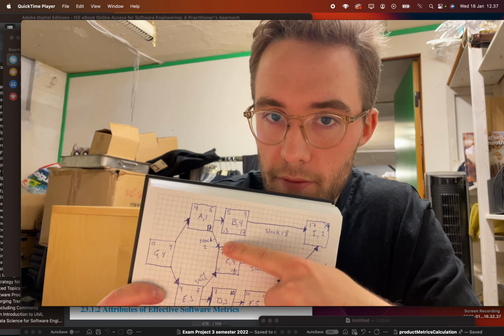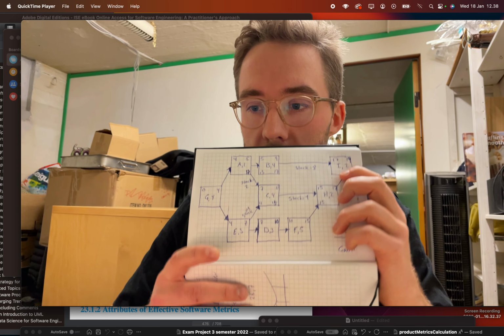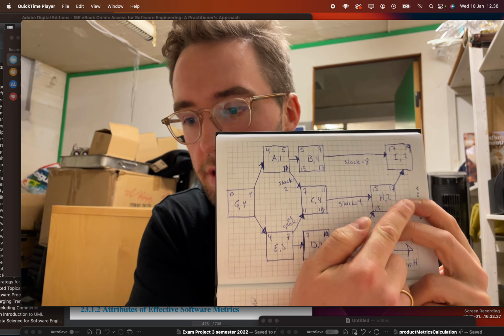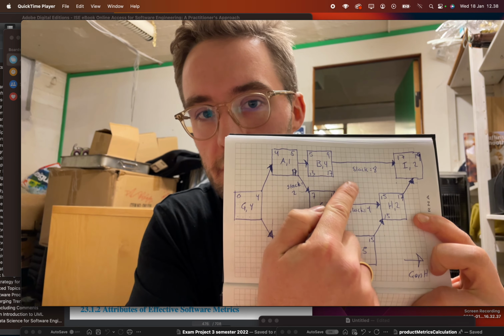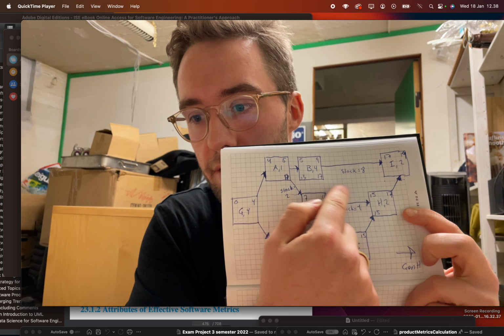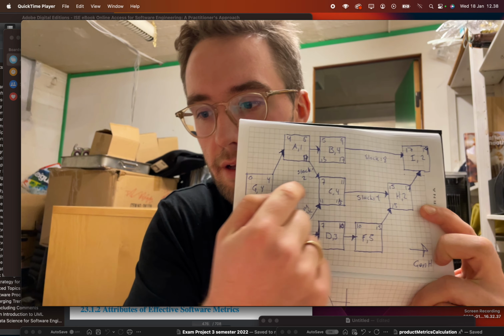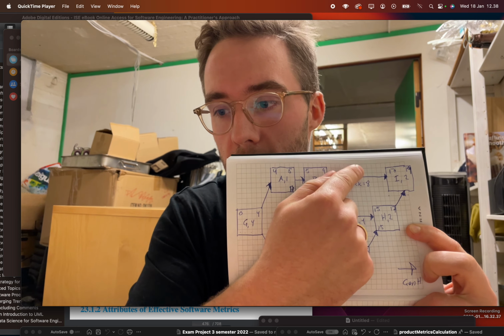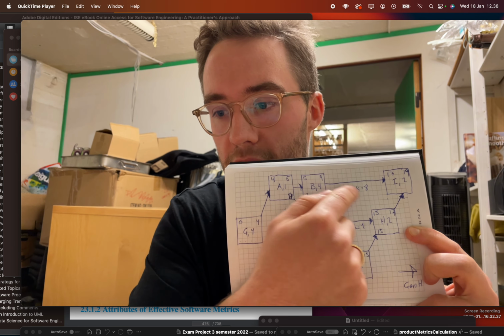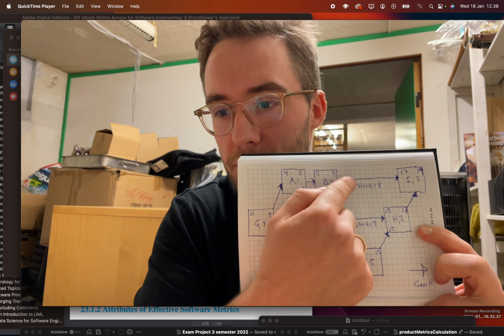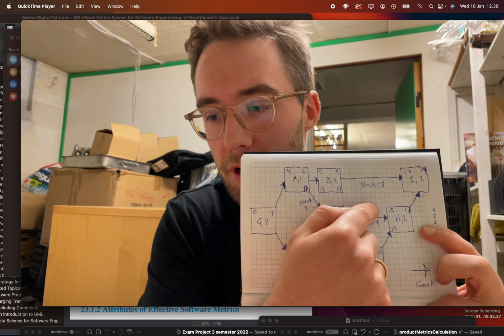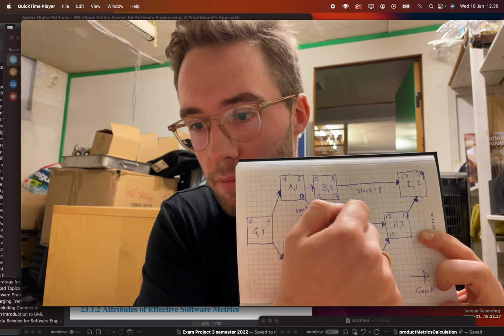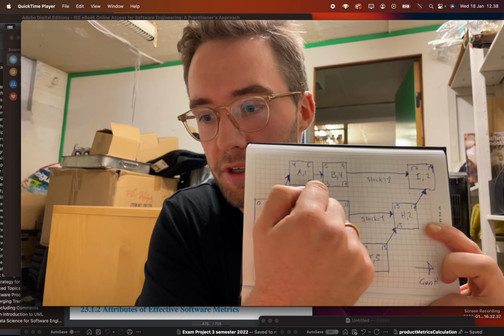And when we go down here, we have this other term, our critical path. Because this path has some slack in it, this is perhaps not our most critical path, because we have excess time for finishing the path.